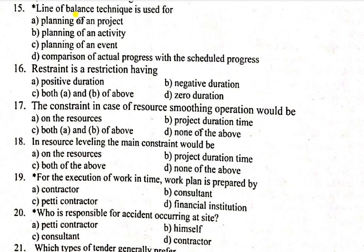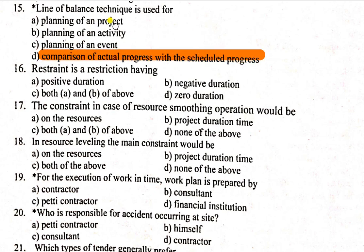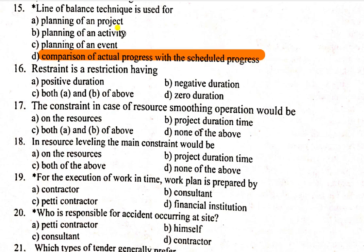The options are: Planning of a project, Planning of an activity, Planning of an event, and Comparison of actual progressive work with the scheduled progressive work. The Line of Balance Technique means the comparison of actual progressive work with the scheduled progress.